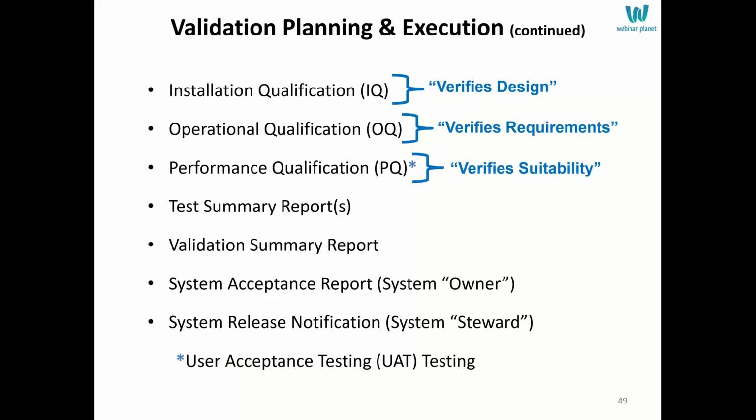Now, this was really just to help the IT people, so it was done as a best practice, but it's not something required today. You don't have to have all your functional requirements approved before someone starts doing development work on them or design work. You don't have to have a system acceptance report at all. But these were good for keeping the users under control and not making the project go completely off scope because they decided to change something and kept doing that throughout the process.